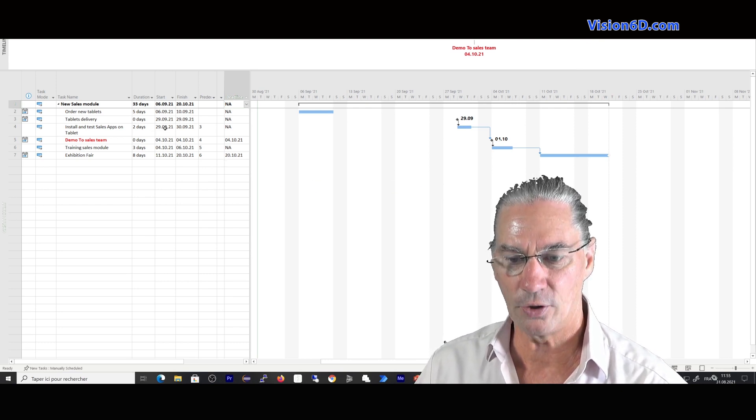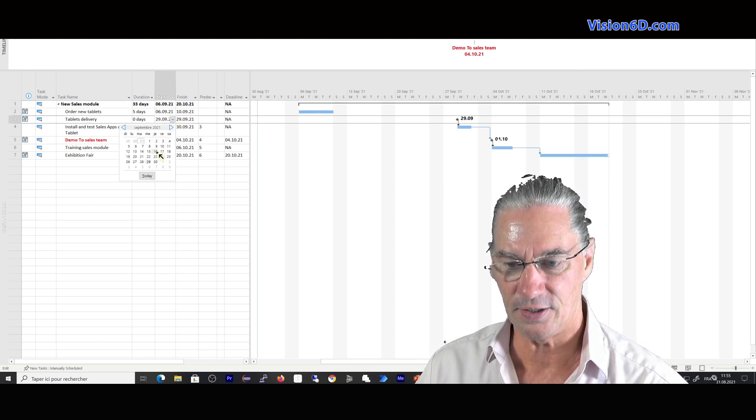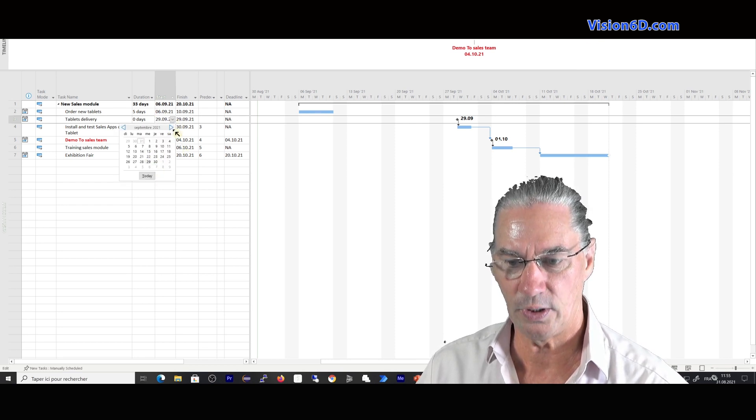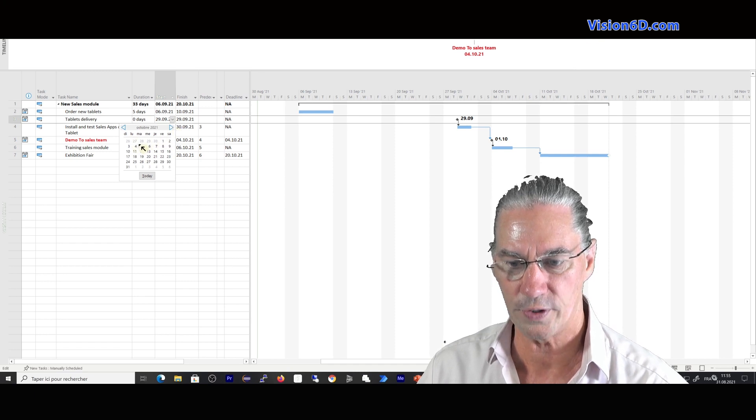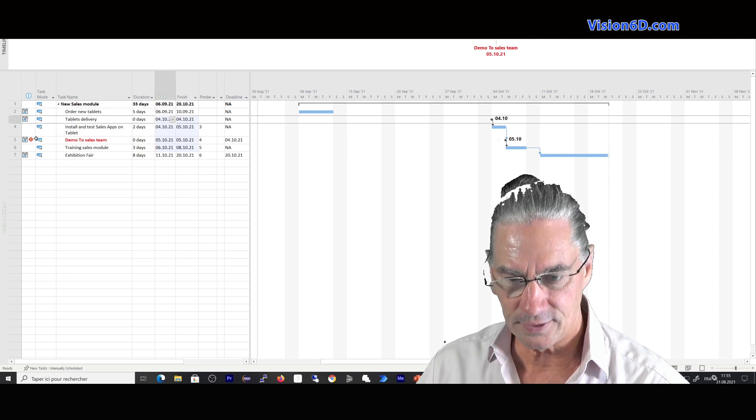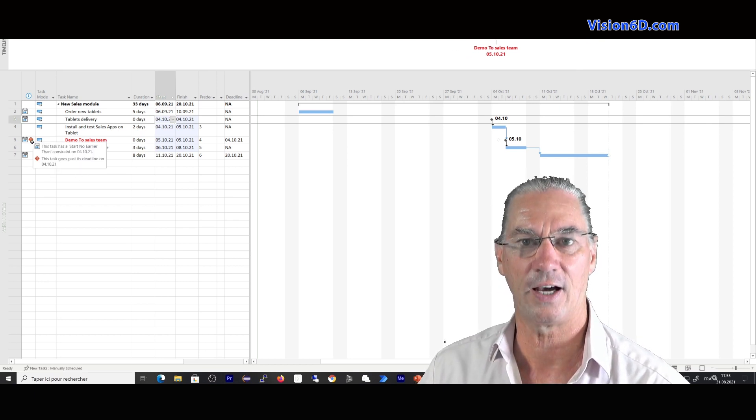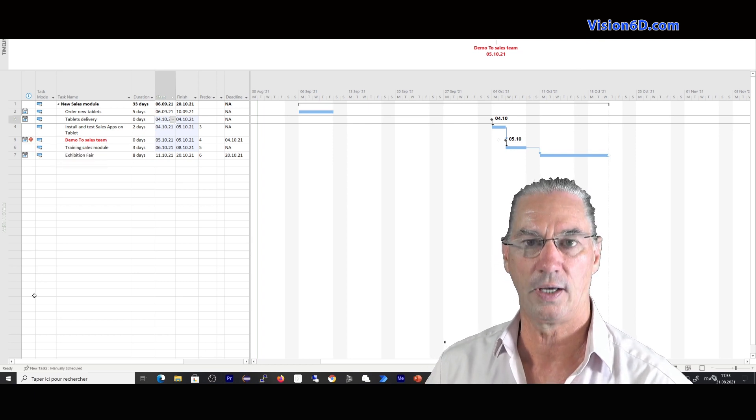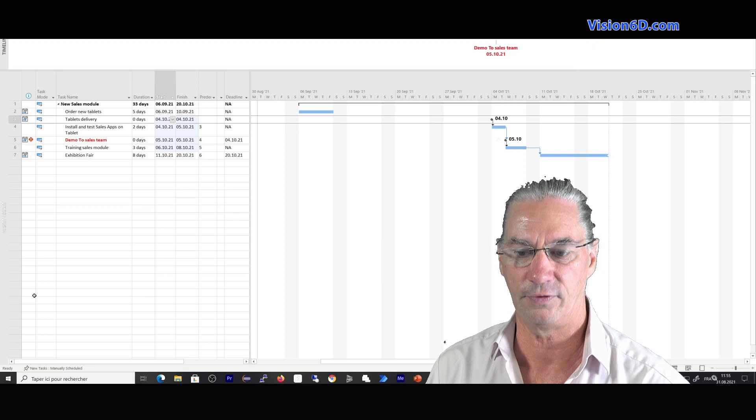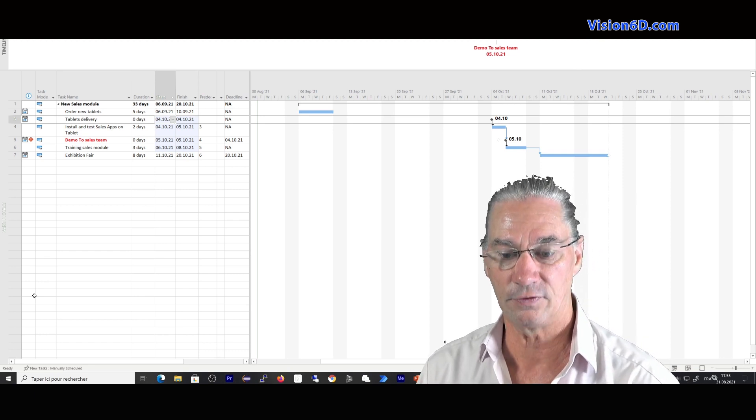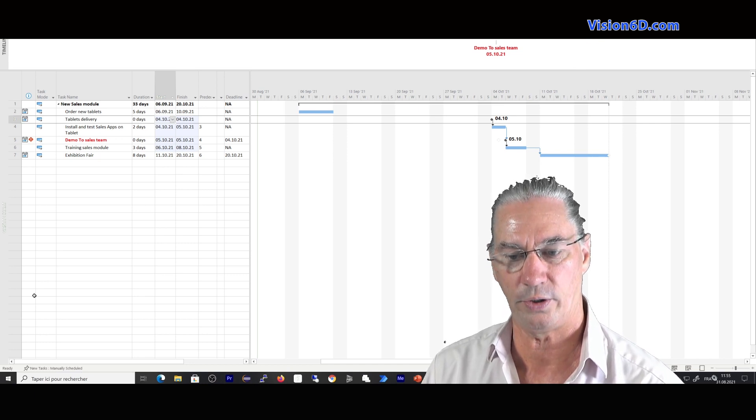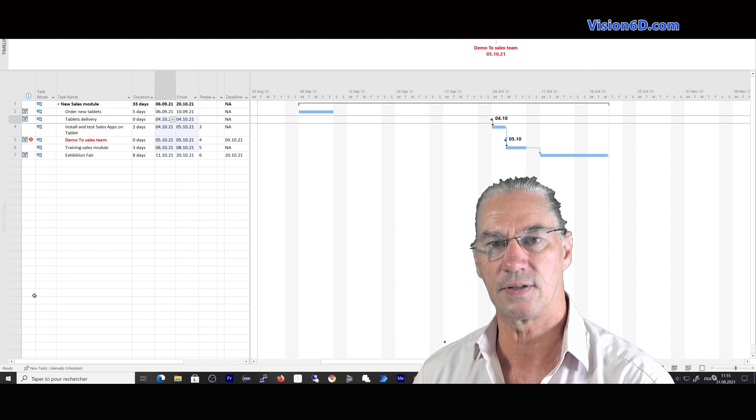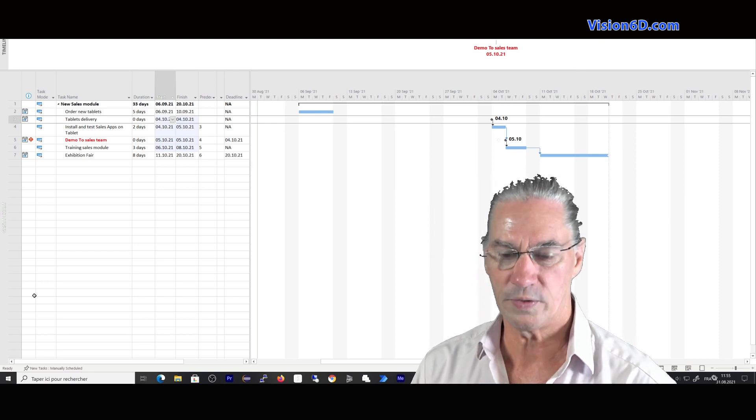And if now I go back to what I had done with you before, is here to say that this will be delayed by one week and be delivered on the 4th of October here, then you have that action and the flag that counts here in front. So imagine now this with a project where you have not just like me an extract, but all the tasks involved into the project. It's an easy way to see when you have a change, if there are deadlines that you will miss.